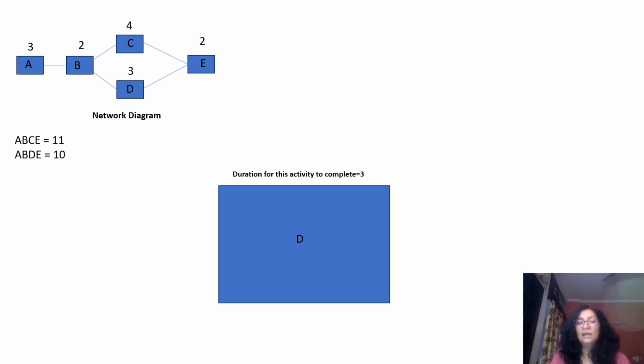So the activity D has the duration of 3 days as discussed before. So we will talk about ES, which is early start. We are starting this particular activity on day 6. Day 6 of your project. This 6 is not the duration. It is the day we are starting the project. I mean this activity, not the project, this activity.